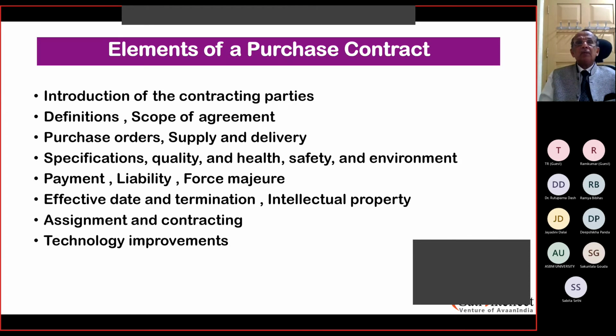Just to give you an example, today is the 2nd of August, and by the time this particular project with the technology you have is available, let's say in 1.5 years, the technology which is prevailing 1.5 years later should be incorporated, not what was contracted.